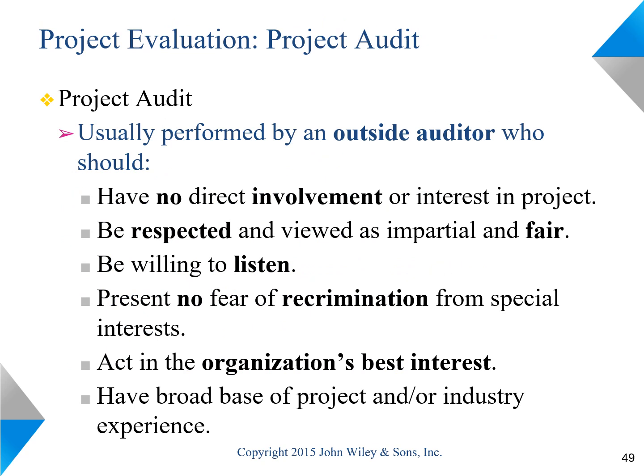Sometimes organizations use a project audit to evaluate projects. These audits are typically done by professional outside consulting firms. They're supposed to be respected subject matter experts who would do a fair assessment from the organization's best interest perspective, and these are very helpful. At the same time, of course, they do require investment from the organization to prepare to have these project audits done.